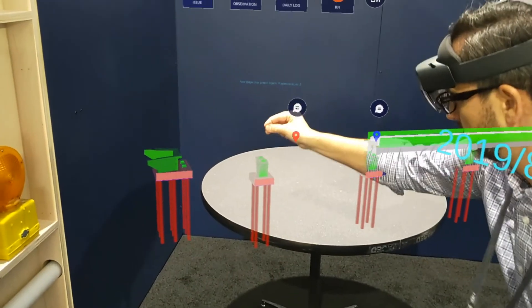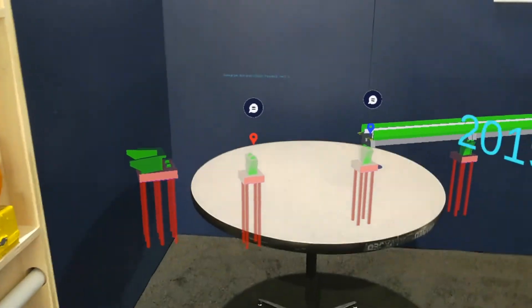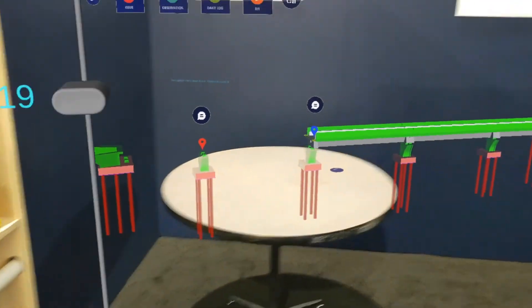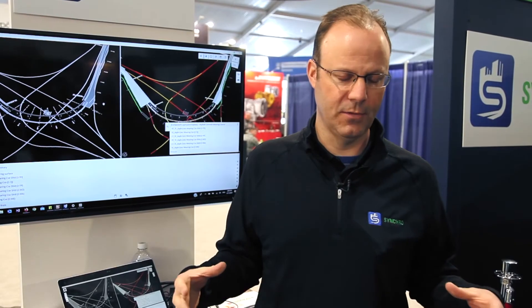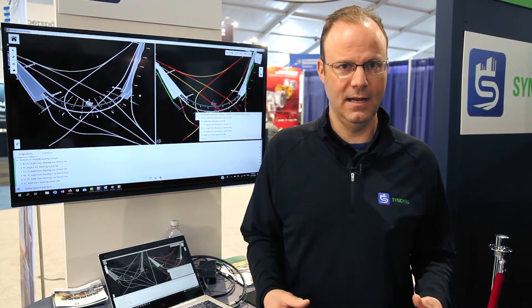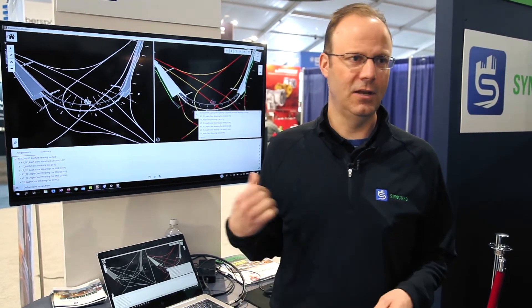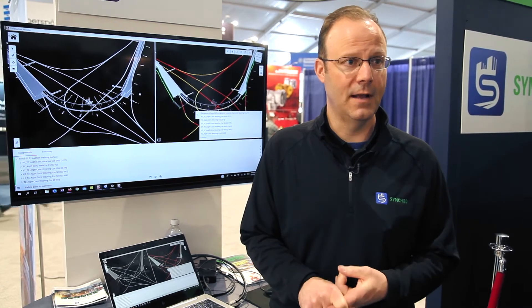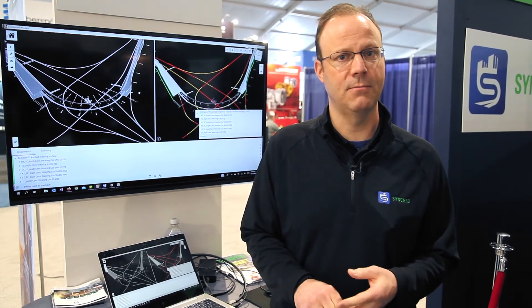4D is all about attaching a schedule, tasks, and resources to a model. This roadway could be a 25-mile corridor that comes from the design tools as one big model object. Instead of going back into a complex authoring tool to redo the model, they can use this environment to split up the model along alignments — both solid and mesh model objects — and then apply the data.